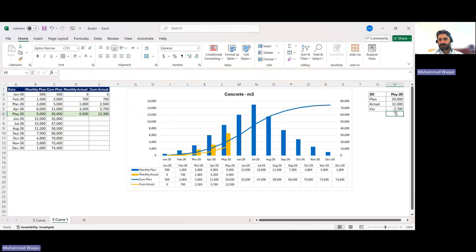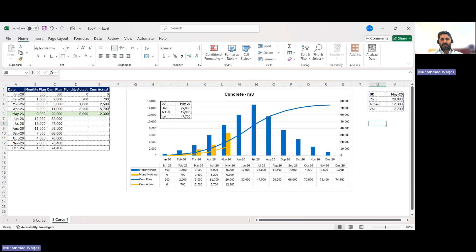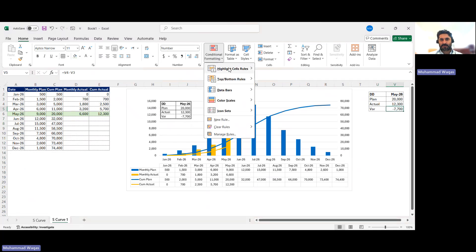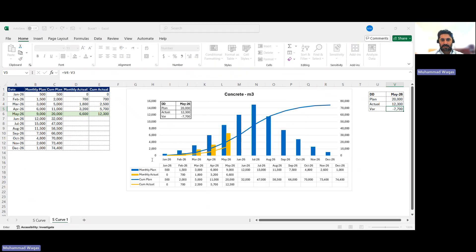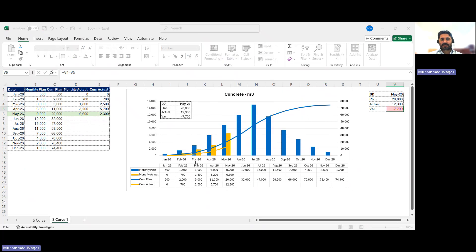I select the summary box, then use the Camera command from the toolbar. I click on the chart area to paste the live camera snapshot of the summary box onto the chart. The variance cell still needs to communicate status visually, so I apply Conditional Formatting: if greater than zero, show green fill; if less than zero, show light red fill. This gives an immediate signal whether we are ahead or behind plan.